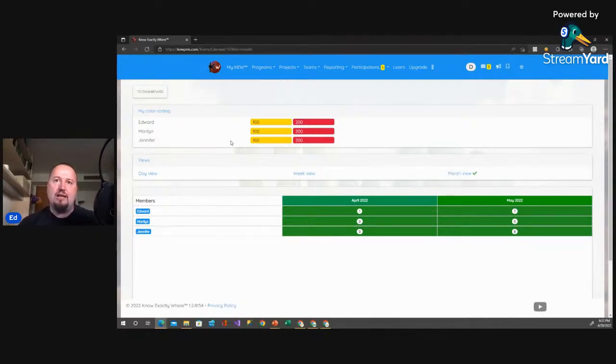So here, what we wanted to keep was, okay, more or less, a more bulk way of managing the workload, which is, I know the type of profile, I know the average number of things they can do at the same time. It is true that one week maybe the tasks that they have take longer, and not the ones that take less, but then another week will compensate, or another day in that week it will compensate. So we're trying to go a little less granular on purpose, so that it becomes easy to maintain